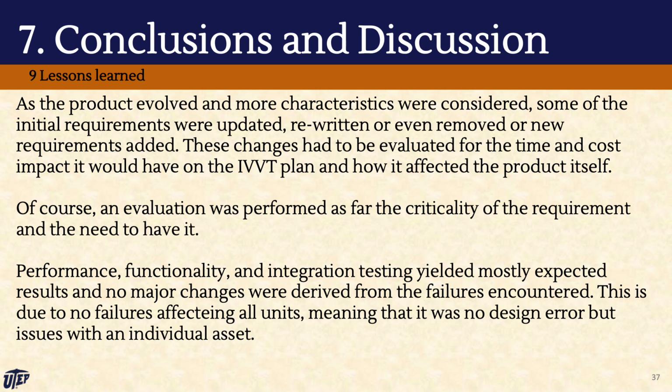The further we progressed through the product life cycle stages, the fewer critical changes were made as the impact greatly increased due to all previous work done and the time it would take to realign to the new requirement. Of course, an evaluation was performed as far as the criticality of the requirement and the need to have it.